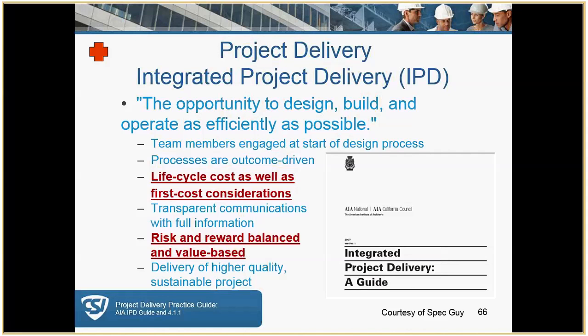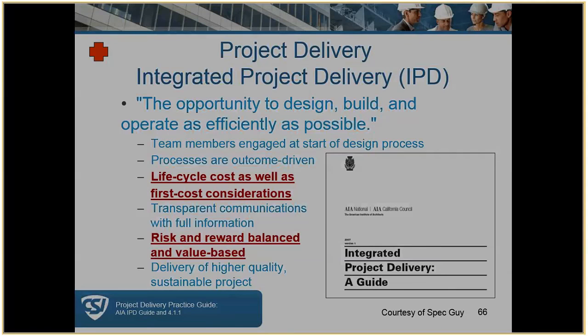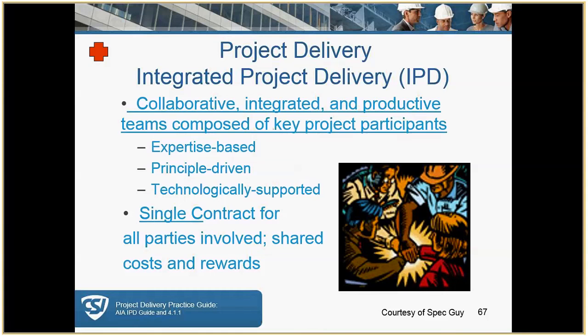I really don't know what to say to this. I haven't personally experienced this, but please go through this and understand what the advantages are. And the most important thing, it's a collaborated, integrative, and productive team composed of key project participants. This is very expertise-based, and it's principle-driven, and technology is crucial. The use of BIM is crucial. And again, single contract for everyone, and there is shared costs and rewards. We're all in it together.